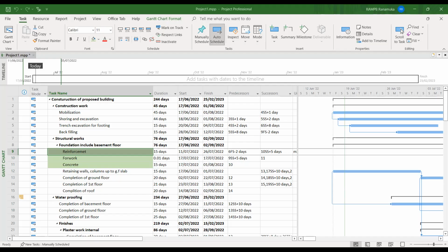break down in the initial stage for the column formwork, column reinforcement, column concrete, then staircase. Only then do we move to the next stage, how to do the slab formwork, slab reinforcement, and slab concrete. In that manner we are going to prepare a program. Otherwise, we don't know when we are going to start the concrete.